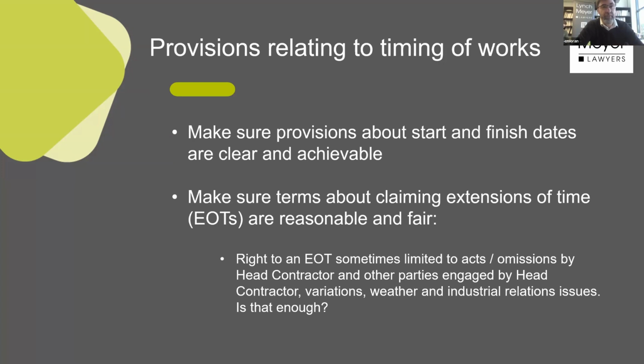to builders: you can have a finish date, but we all know that there are going to be things that come up. So if you can factor that in earlier to the finish date, then you have to worry less about what I call the weird and wonderful world of extensions of time, which is really the part of the contract that I spend a lot of time thinking about, and when you are able to get them. So try to make your finish dates as achievable as reasonably possible. You'll obviously get pressure on the other side, because the other side wants you to finish the works as soon as possible. So there's this tension that exists. You'll never get things completely your own way, but at least turn your mind to these things.